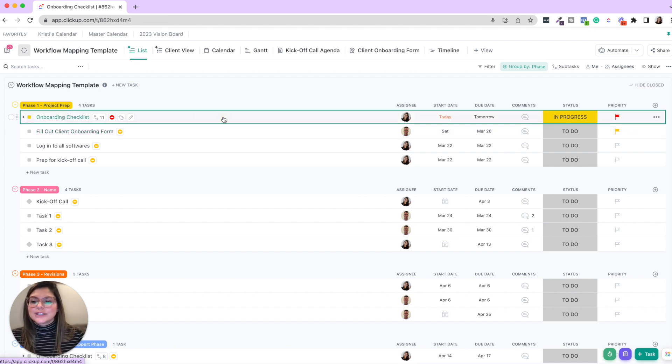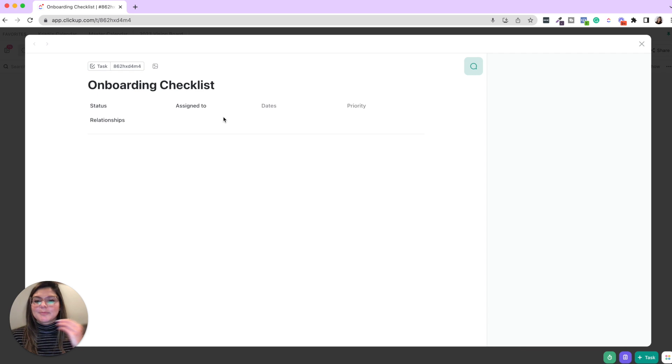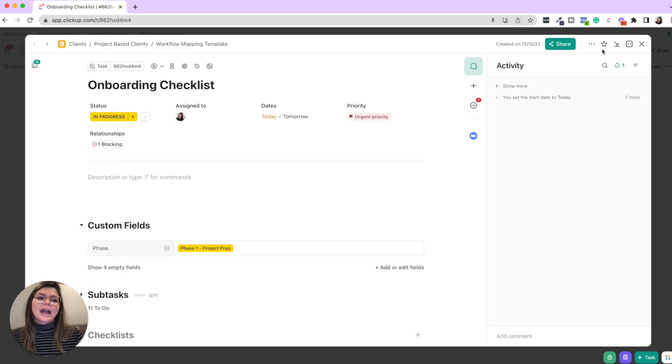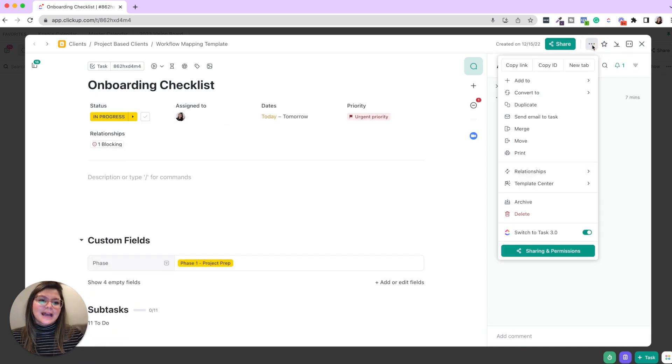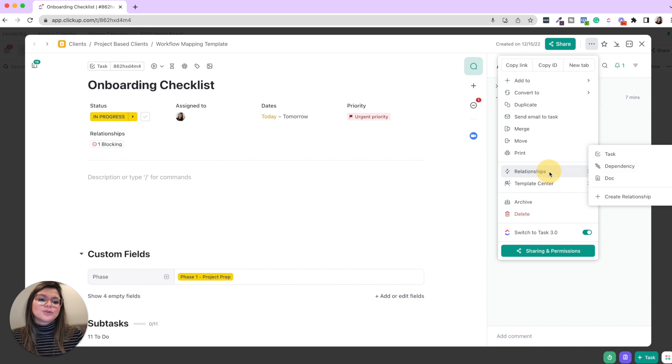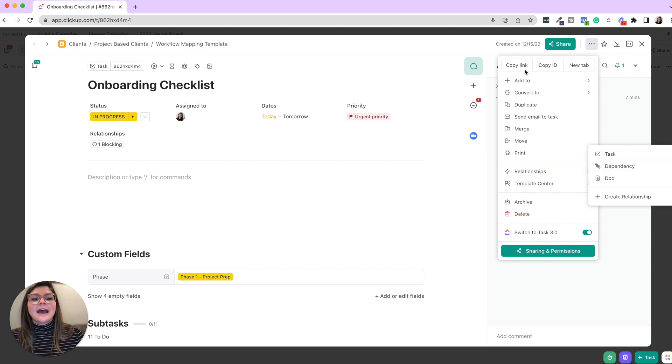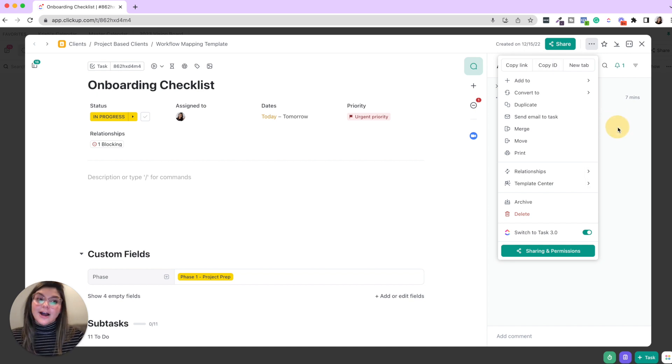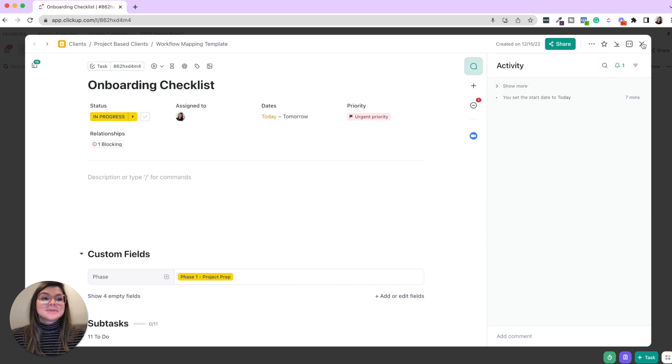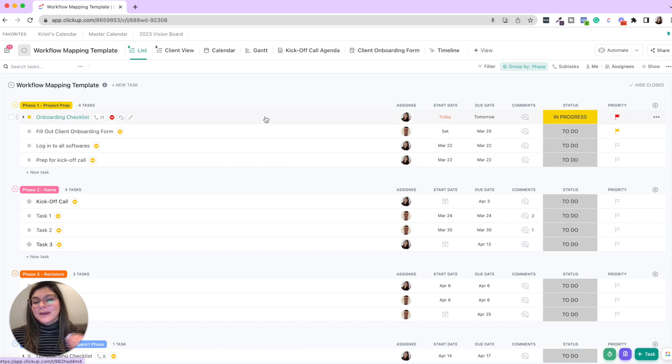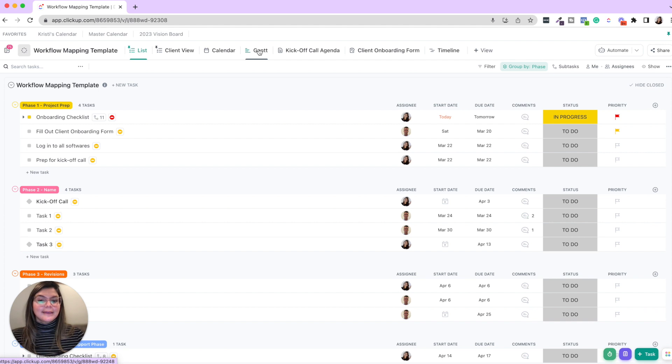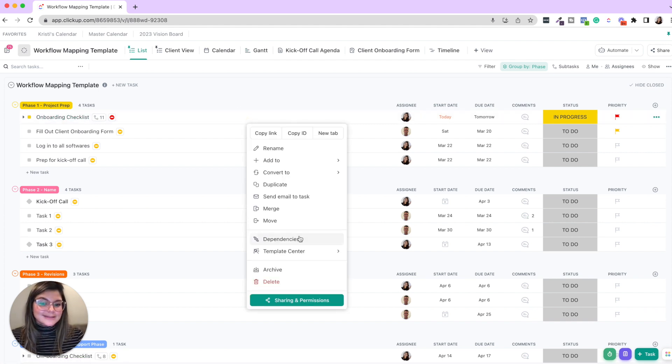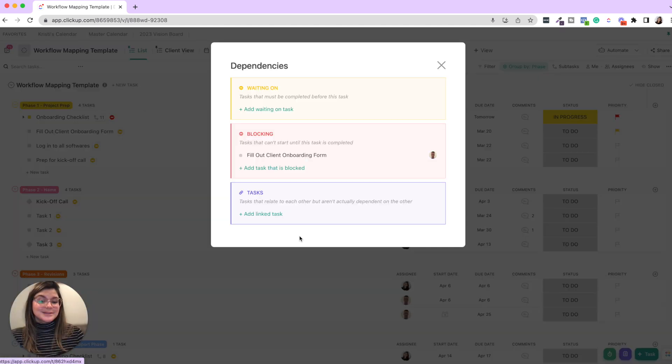So how do you actually add these dependencies? Well, if you click into a task, there are a bunch of different ways you can do it. You can either go into the task settings, go into relationships, and then add dependencies. Every single task is going to have a link. And if you have task IDs on ClickApps, you'll have an ID as well. One of my favorite ways to actually link dependencies is either in Gantt view or just right-clicking a task and clicking dependencies.